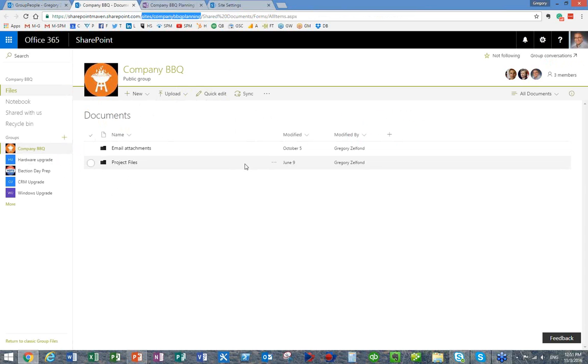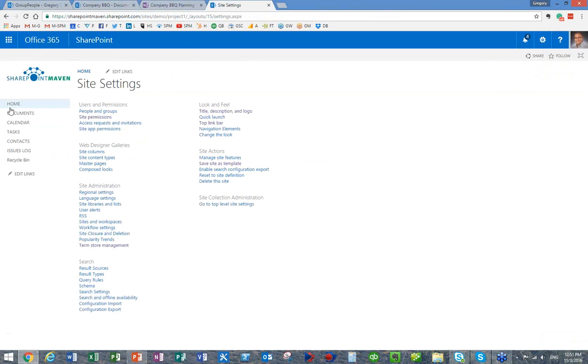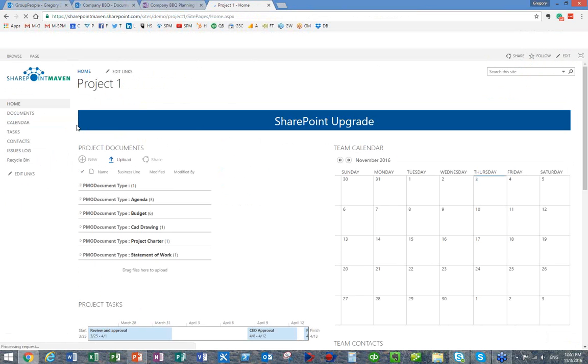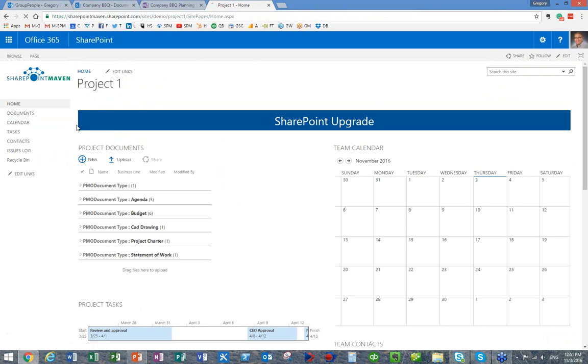Here they are. If you need to move stuff after, you should really move away from moving stuff. The beauty about team sites is that when the project is done, you really don't need to move or migrate sites to another place. I really discourage my clients from doing that. There is no need. Just flip security to read-only and leave the site where it is so it becomes a permanent archive.